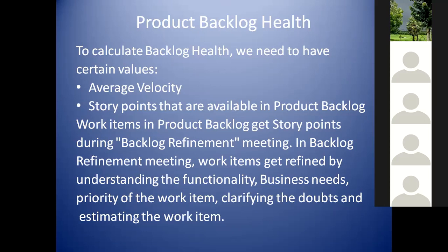For example, your team is new. You are working on planning activities, preparation activities, infrastructure setup, and all those things. Is it really worth considering those sprints as part of your average velocity calculation? May not be, right? Because that is not the actual deliverable. It is part of your preparation. When you start the average velocity calculation depends on you, because in the first 2 to 3 sprints you may not have it. That's what we discussed in how to manage average velocity for new teams.